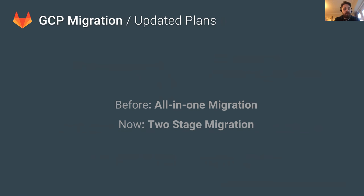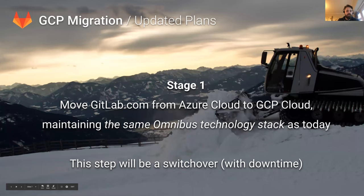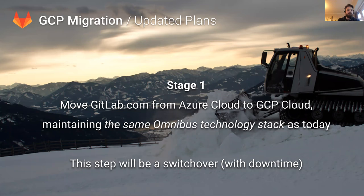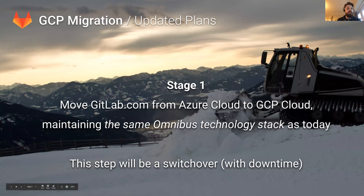The solution was to break the project down into two stages. The first stage is basically to keep the same technology stack as we've got now. The production team will set up a new environment in GCP, much like the existing one in Azure, and we are working to get the geo-transfer started and shift everything across.